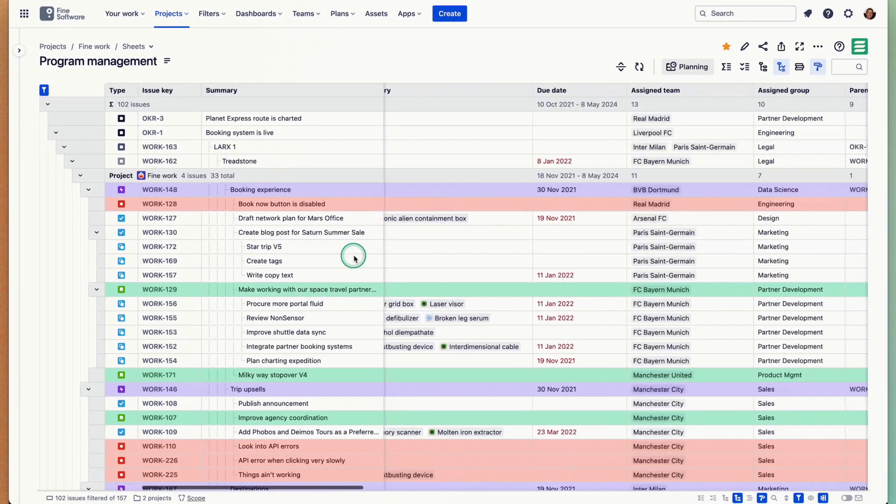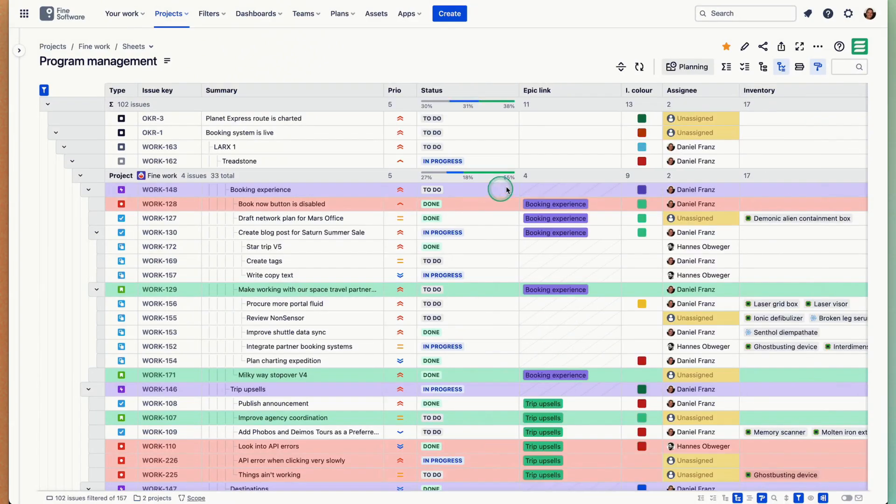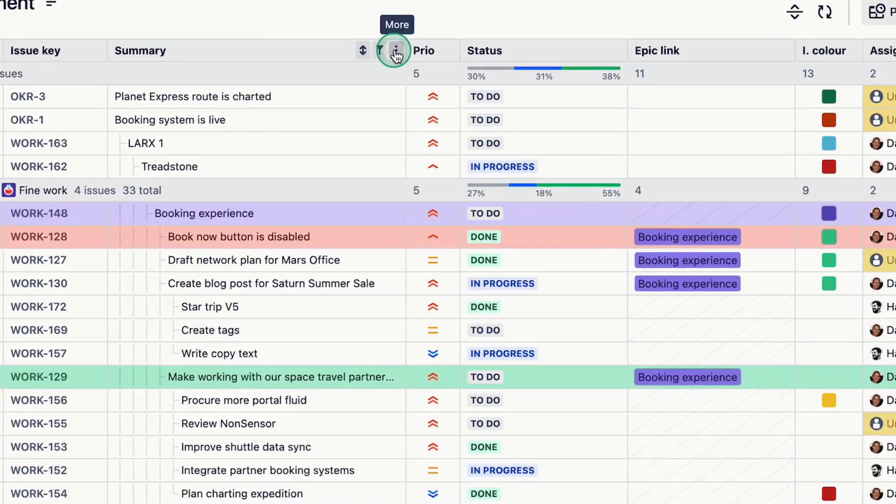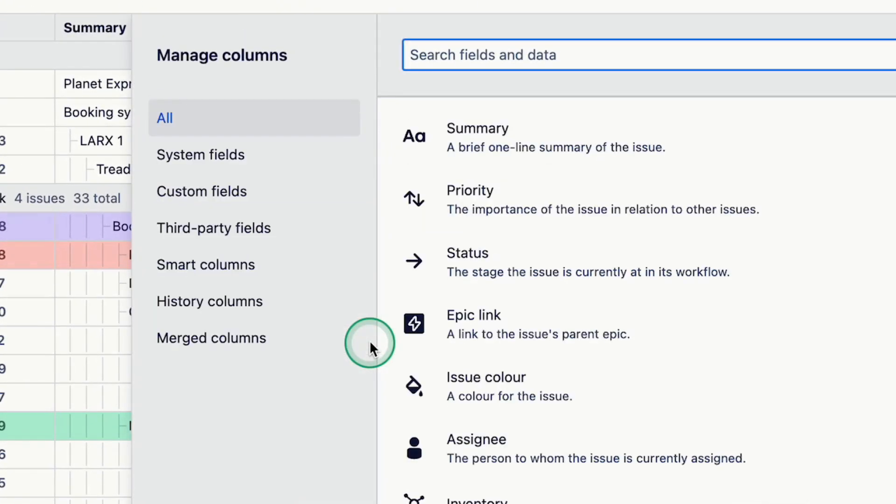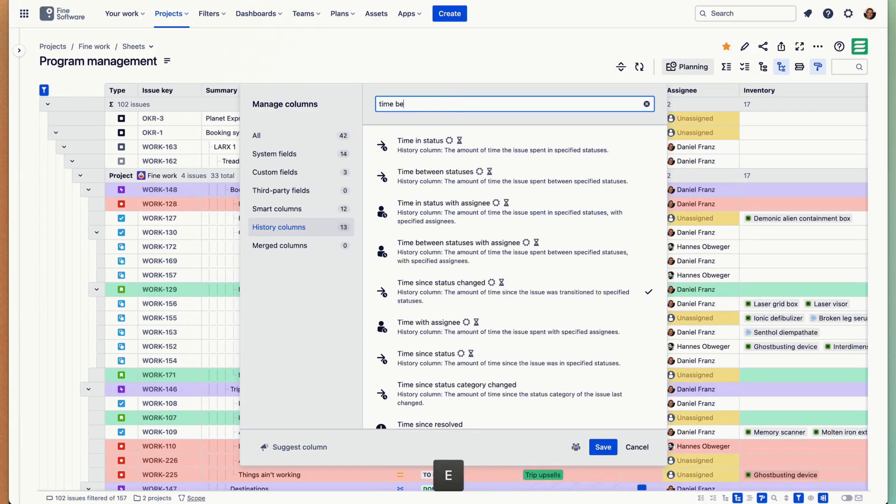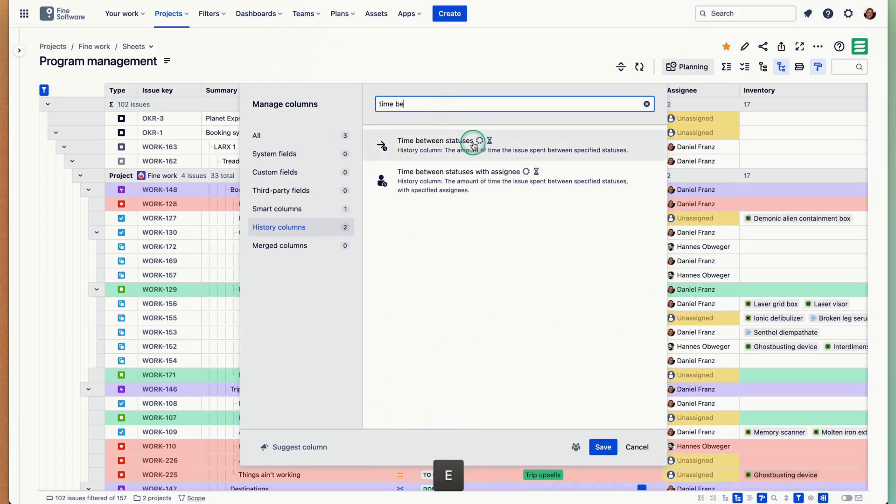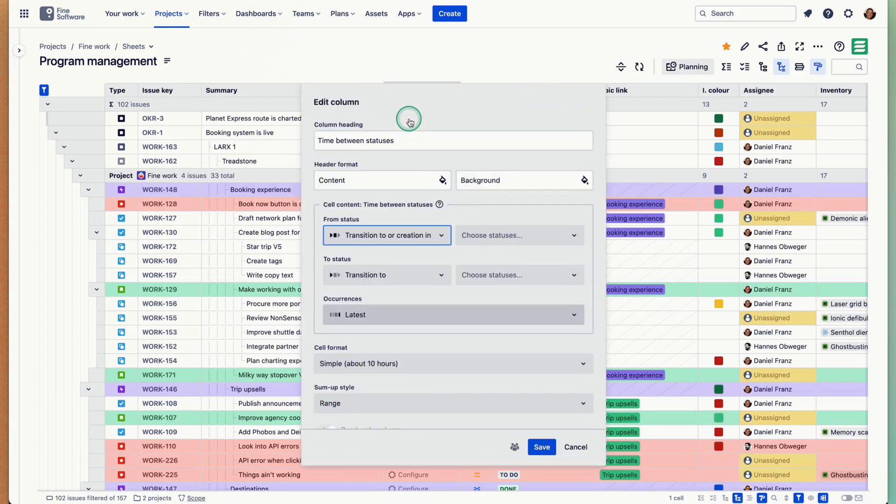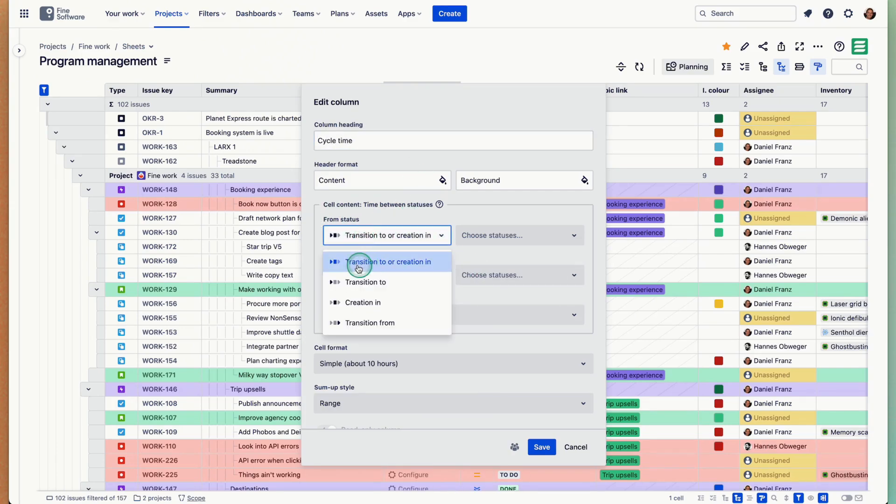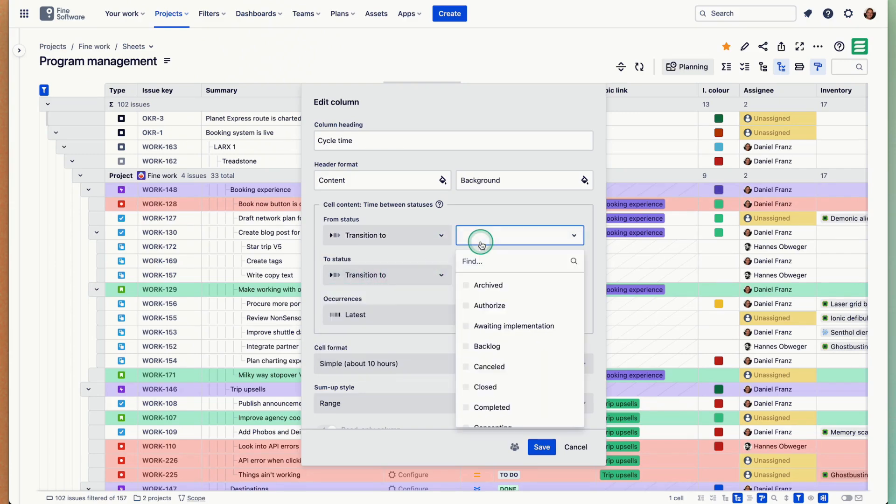What else? There's something we shipped more recently which is history columns. I mentioned them earlier when I added a few columns. Let's do that again. Let's add a column here, a history column. Let's take time between statuses. You will see there's a configuration necessary here. I can say cycle time for example. There's a from status and to status. I can say the transition is to, so this would be in progress. You can put multiple in here.